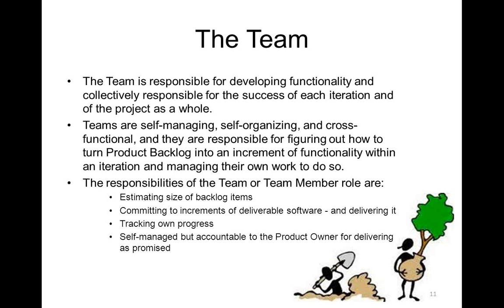The team size is typically recommended to be 6 to 9, or 5 to 7 or something like that, because if the team size becomes too big, it becomes difficult to make them work in a united manner. The more people there are, the more diversity of thought and action there would be, and there will be less chance of their being very cohesive and committed together. So that is the team size typically recommended.